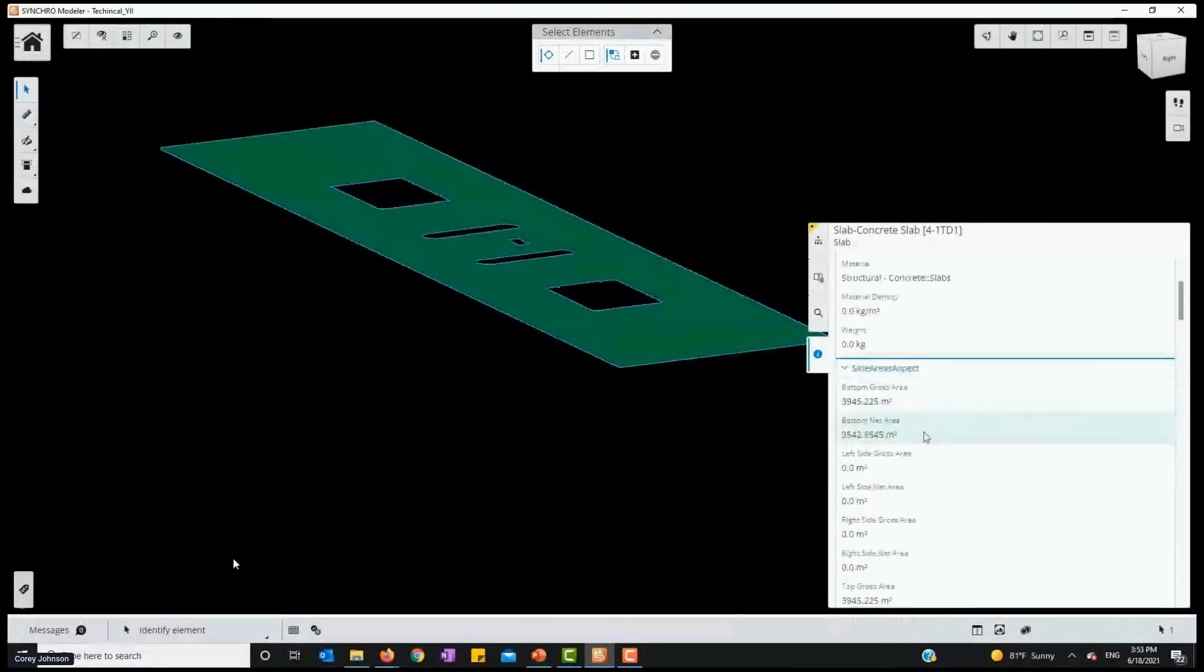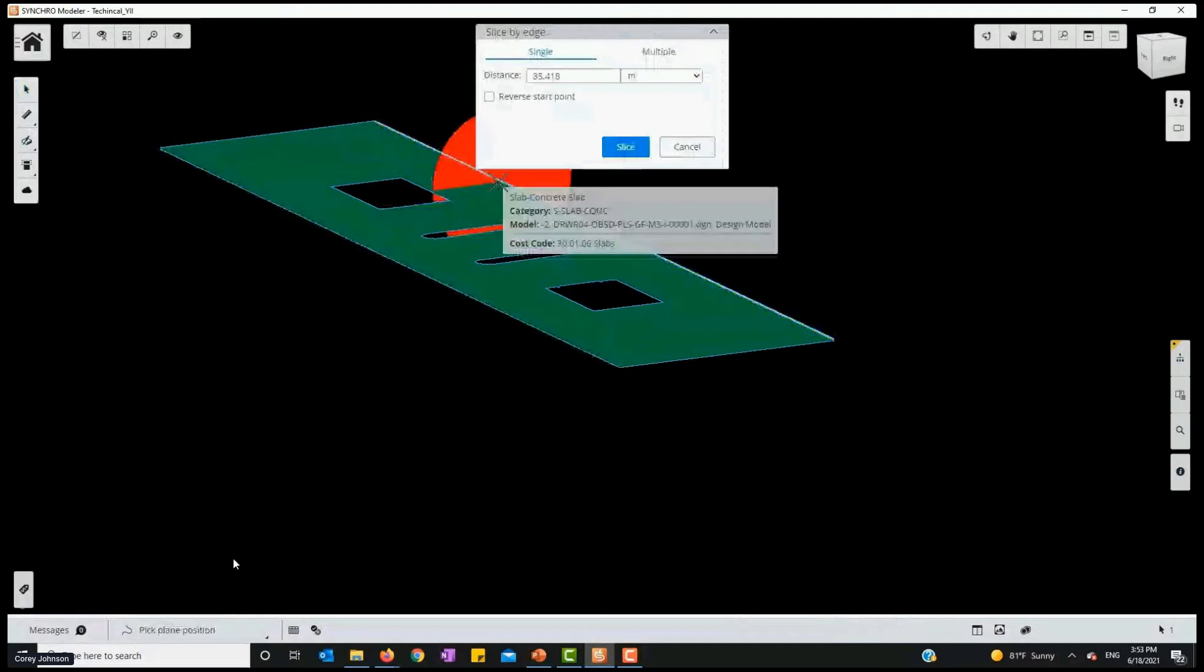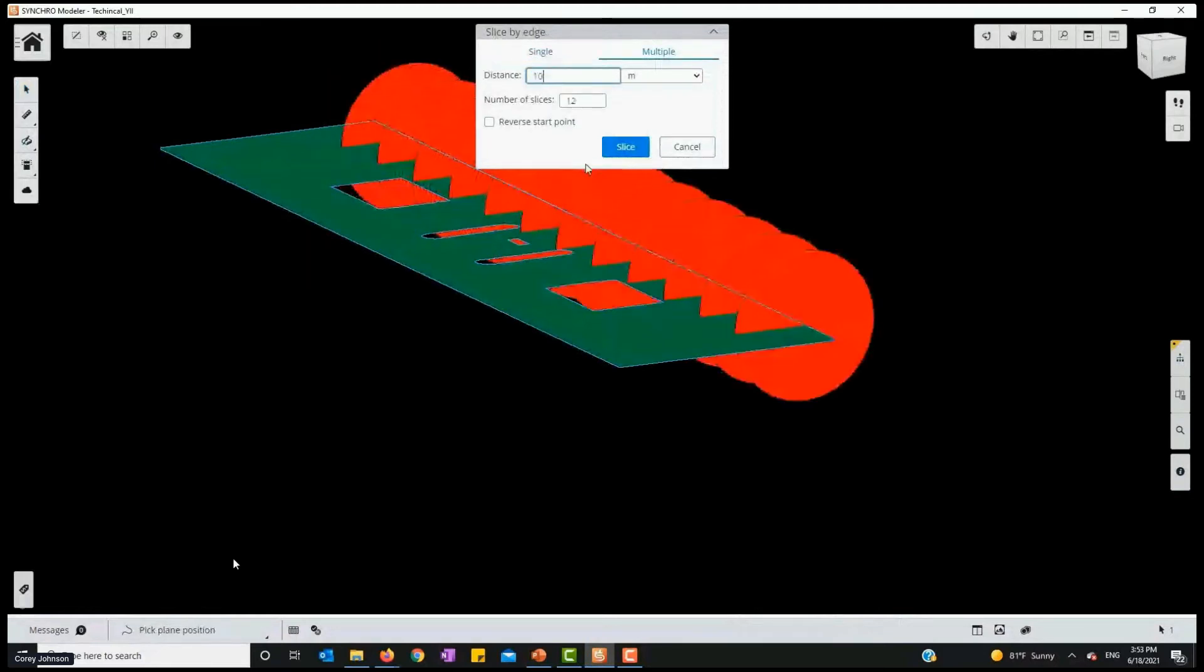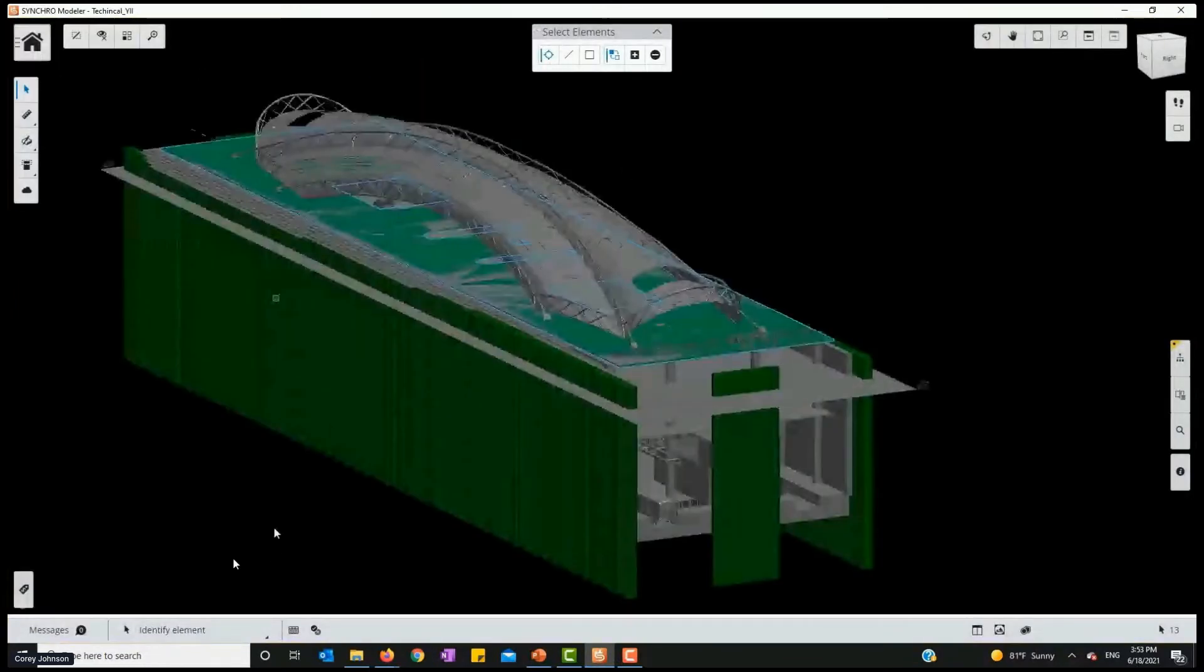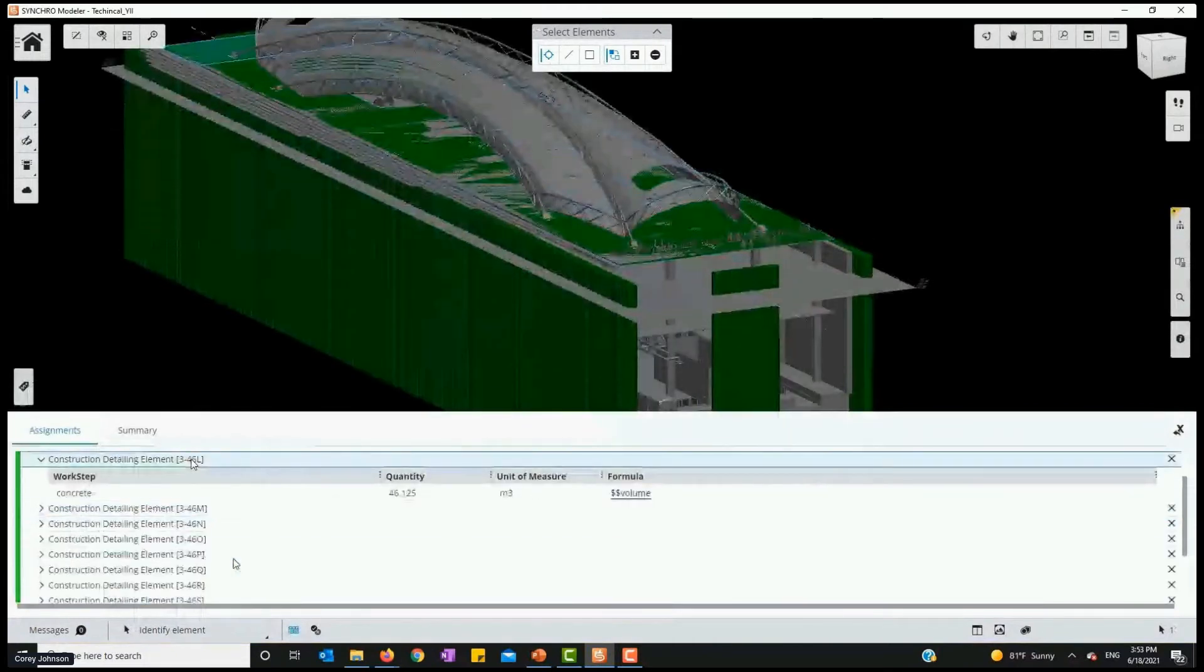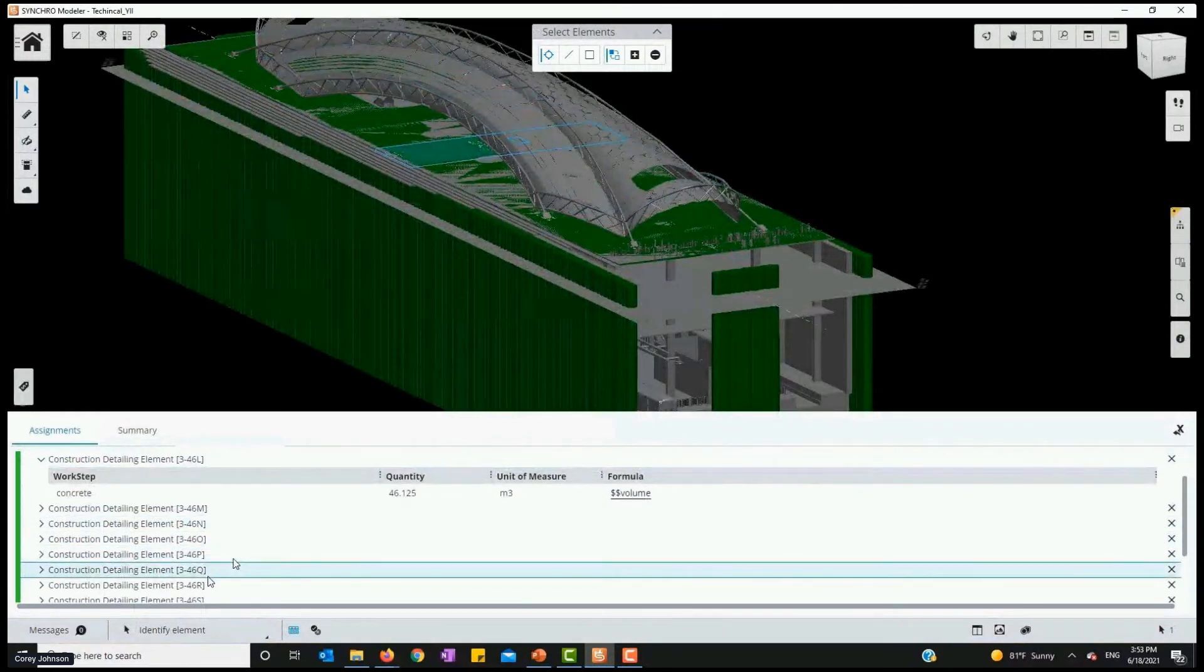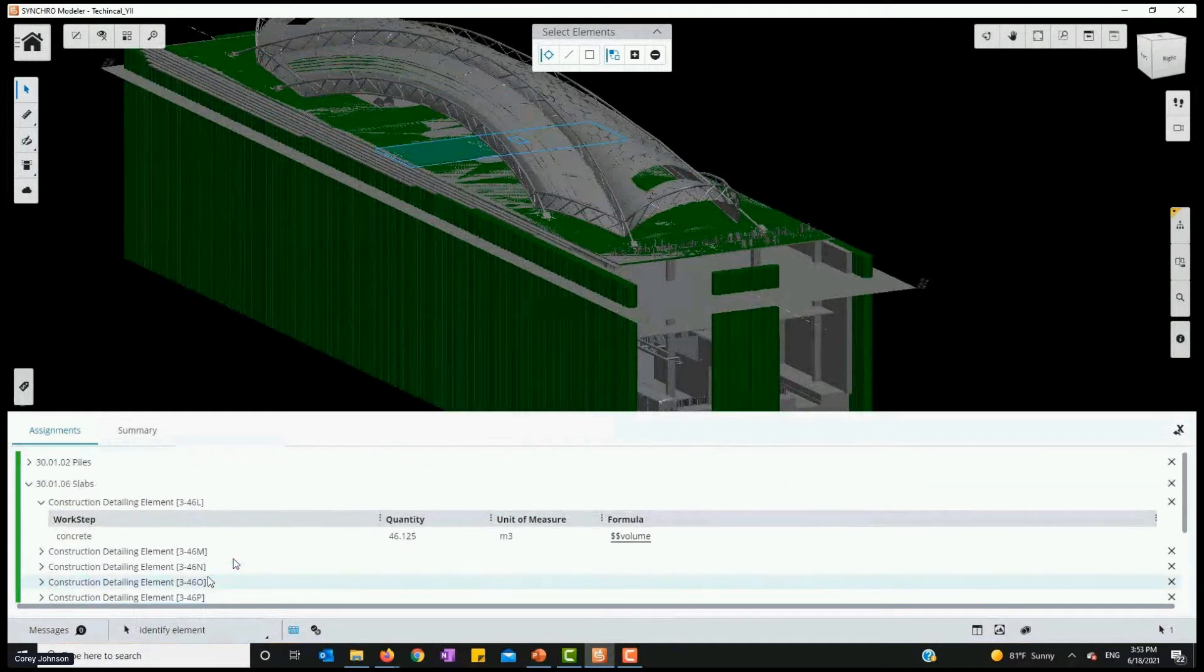So here you see a huge concrete pour came from Revit, but that's not how we're going to build it. So we actually have tools - one of the few in the industry - we can actually, I call it slice and dice. I can slice this slab into pieces. It's asking me if I want to keep my cost codes. Why is that important? I've already assigned my cost code - it knows it's a slab. Now I'm making it from one into ten. Now here's a beautiful thing - I don't destroy the original. There's a parent element, and then these are all children elements.